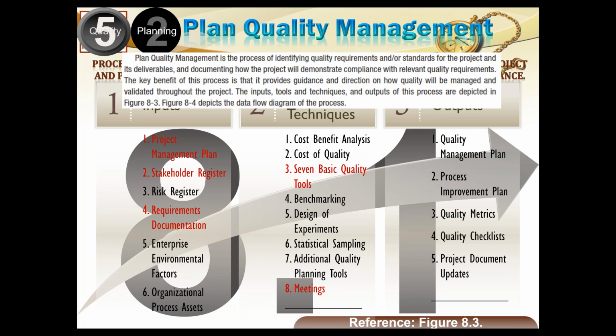So if you have to bake a cake, the parameters in baking a cake are probably what kind of dough you are making, what kind of pot you are using in which you are baking this cake, how much time you have to bake it, and how much temperature you have to give it. For example, these are the 4 different variables, and with a different combination you can have a different kind of taste. You have to see which is the best, which will be accepted by the customer.